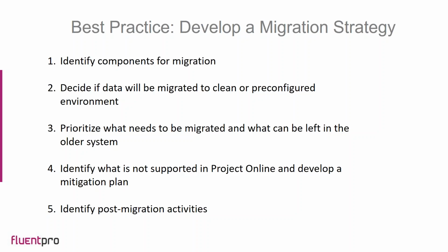FluentBooks supports both scenarios, but migration to a pre-configured environment needs even more careful planning and understanding that such entities as custom fields, lookup tables and calendars cannot be mapped between source and target systems, and their names should be exactly the same.